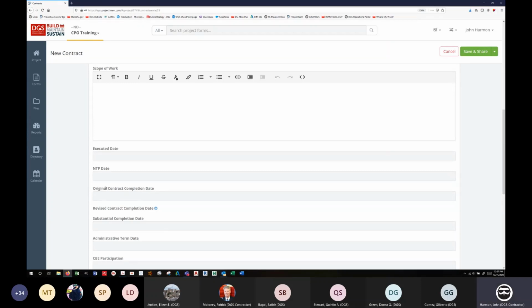Okay, so that's why this one has original. Revised contract completion date is going to show if and when there's a change order that increases the contract completion date. We'll talk a little more about that with change orders.